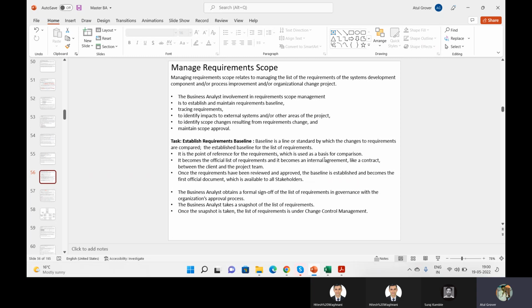Like when I work on the SOWs, in the SOW it is very clearly mentioned: all the infrastructure of ServiceNow has been developed and is ready, you guys can start your project. But on the day my team started working on that particular project, they said, Atul, it is very slow. I'm not even able to open the link. Later on, I came to know that they don't have a complete infrastructure available. Some of the servers are not mounted properly. Some of those servers are not placed on the right racks or the right data centers.